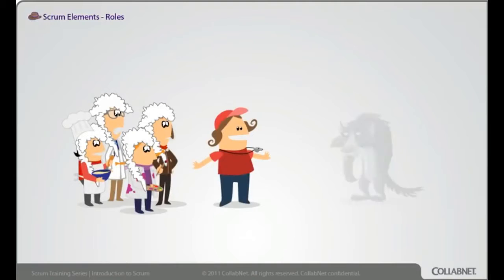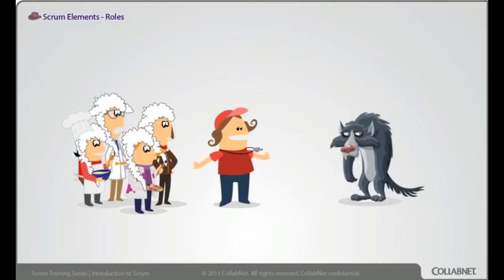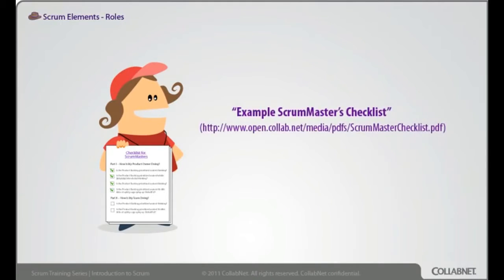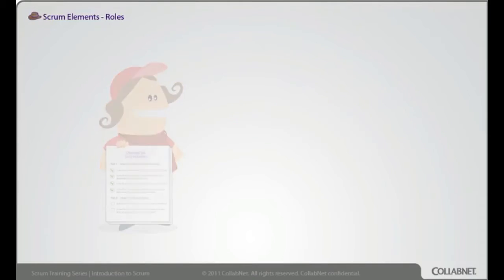The Scrum Master protects the team from distractions and interruptions, gets things out of the way of natural team self-organization, removes impediments affecting the team, facilitates the process, helps teach people how to use Scrum, promotes improved engineering practices, enforces time boxes, provides visibility, somehow does all this without any management power. How is that possible? It turns out power isn't even the most powerful type of influence. For further information on the elusive Scrum Master role, see my example Scrum Master checklist, an example list of things the Scrum Master will be concerned with fixing.